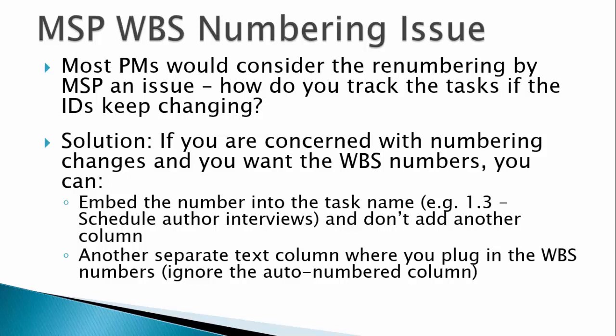Another possible solution is to add a text column to the entry table. Project supports many free format text columns which you can label, where you type in the WBS numbers. Having a solution like this is important for a large project with many tasks, so you can easily identify tasks with certainty.